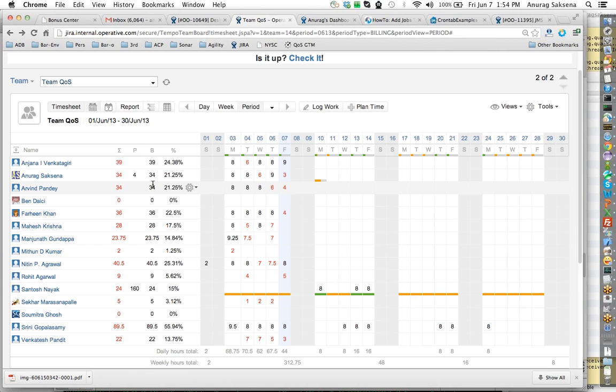So you'll have to talk to the QA, will have to talk to developers, the developers will have to talk to product owners, will have to talk to QA perhaps, and there'll be a lot of communication that will happen to understand which story team members can work on which day. Based on that, they would plan time in Tempo, and that is a very, very deep, granular level planning for your whole iteration. So in an ideal team, for all these members, they would have time planned against the stories that they're going to work on each day.